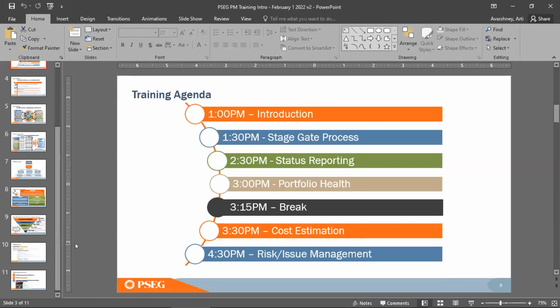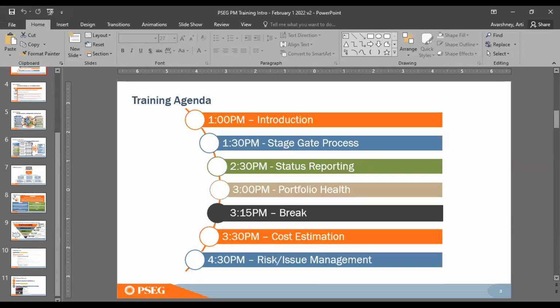Never use the old file and start modifying it, because we might have made some changes to the new template, and you end up using the old template, and down the line somewhere in the procurement section or in the BCCT, they may identify that you are using an old template and you go all over again, right? You have to redo the whole steps. So download the new template from the source and use that template, and then fill up the data as you are requested.